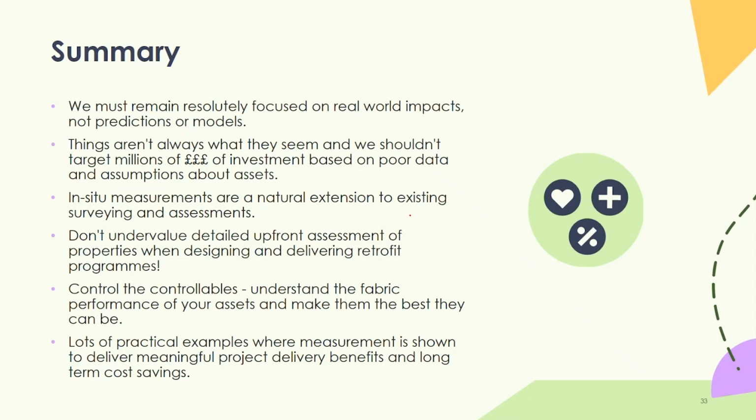And so in situ measurements are a natural extension to existing surveying and assessments. Whilst I'll be the first to admit there's going to be additional upfront cost in obtaining some of these measurements, as it's going to involve an assessor being in the property that little bit longer than a conventional energy assessment or retrofit assessment, the benefit longer term is in informing the retrofit design and the specification. There is also the value of then being able to go back after the retrofit and measure, and use that for quality assurance purposes, and potentially leverage finance and carbon credits because you've measured directly the impact that your spend has had. I think that is the direction of travel for the industry at large.